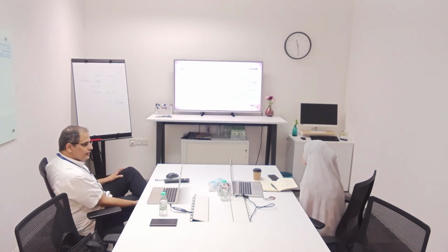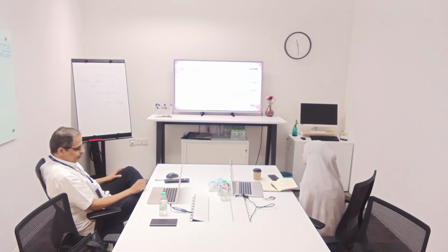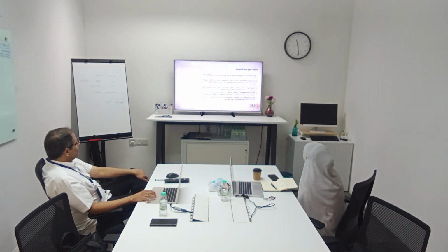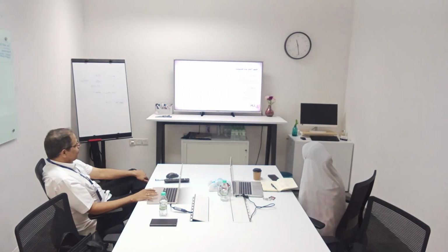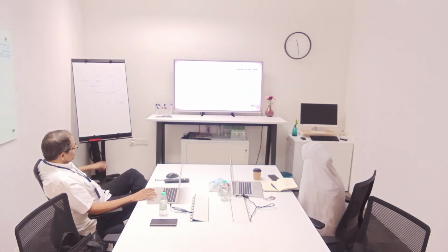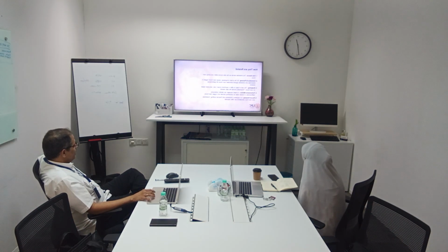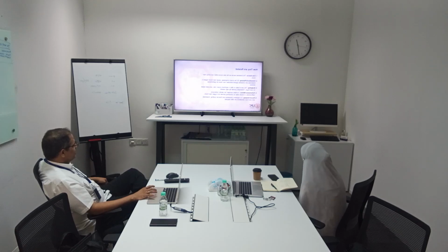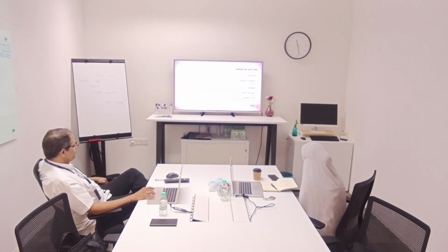So these are the things that's why this one is important for how you relate it to the budget. So the timesheet serves as the data source when they're calculating the man hours. Okay. Estimate and planning. As a project progresses, actual man hours logged in the timesheet are compared against the estimation. Budget, the cost of the labor is often significant in the project cost, calculated based on the man hour timesheet, provided the data needed for this man hours.